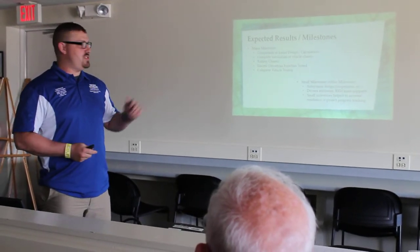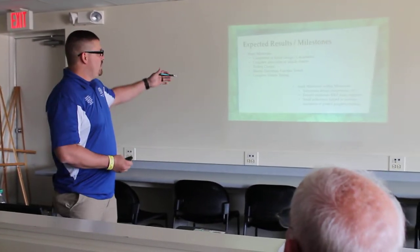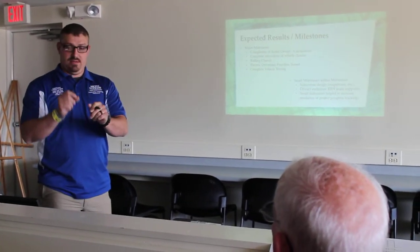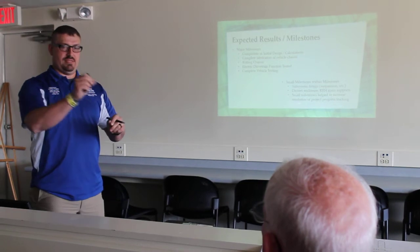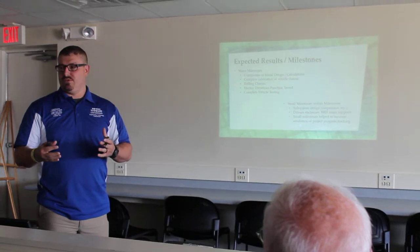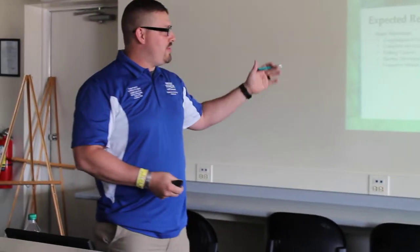What's causing that? And so we started setting up some small milestones within the others to help us keep track of that. So for the completion of the designs, we'd set up subsystems in that. So once the suspension is designed, that's a milestone. We know we're there. Brakes are designed, that's a milestone. And the same thing with fabrication. We do just the driver's enclosure. That was a small little milestone. Front and rear main hoops for the roll cage, that was a small milestone. And by doing that and putting all those small little milestones, it increased the resolution of our tracking. We were able to track it a lot more frequently. And it kind of helped motivate the members as well, because instead of going weeks between little successes, we were going days, and we're constantly knocking things out.